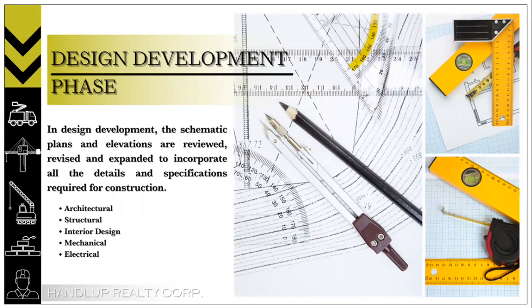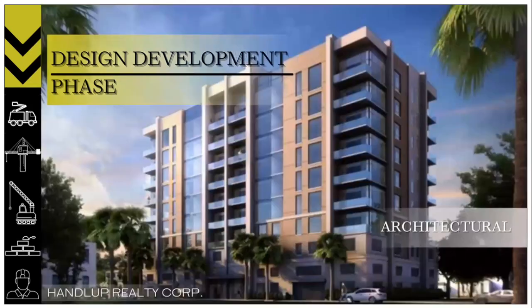preliminary schematic design documents. Moreover, it consists of design and other documents including plans, sections, elevation, typical construction details, and diagrammatic layouts of the building system to fix and describe the size and character of a project as to architectural, structural, mechanical, electrical system, and other elements as may be appropriate. Let us proceed to the architectural design.